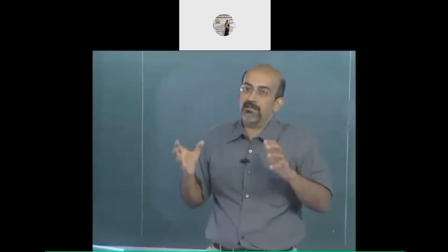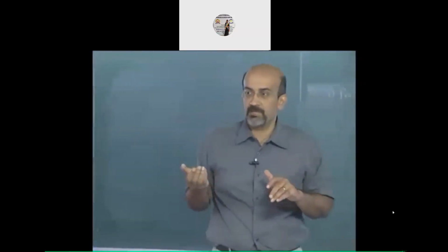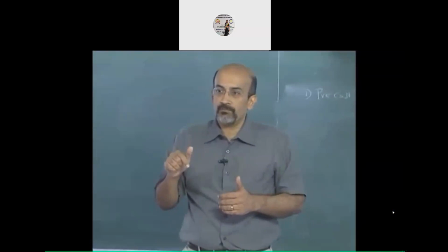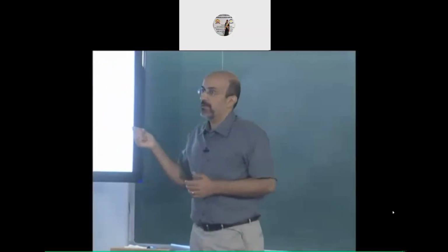Generally in construction, this is one of the most common ways and probably one of the easiest ways to break down, because components are physical. But a lot of times, say something like project management of a service, you cannot break it down by component. But in construction, yes, you can a lot of times break it down by component. But we have to realize that breaking down by component is still only one view. We might require other views of the project. For example, we might want a view from different subcontractors.